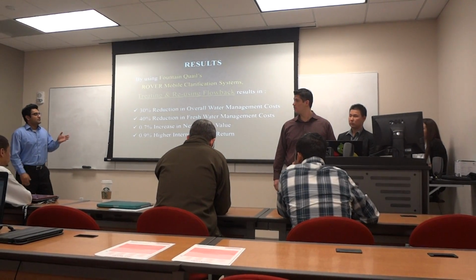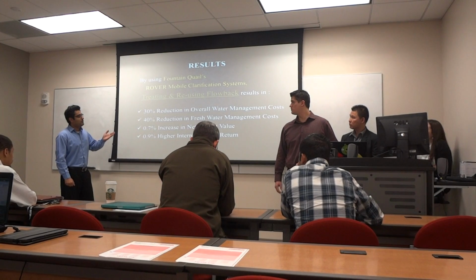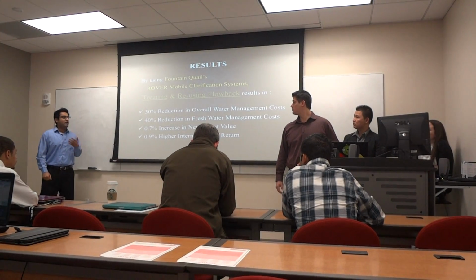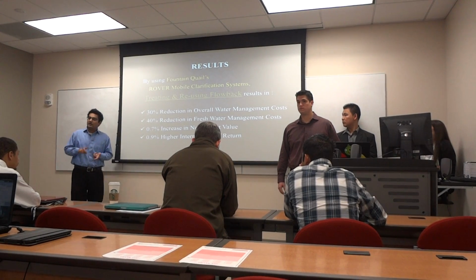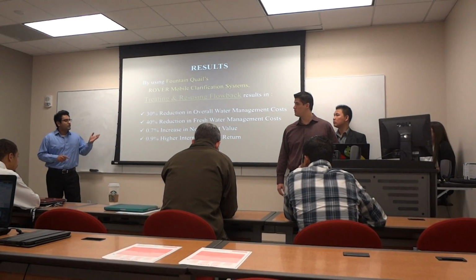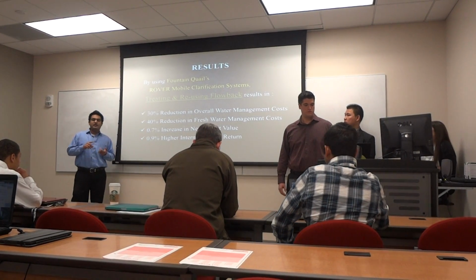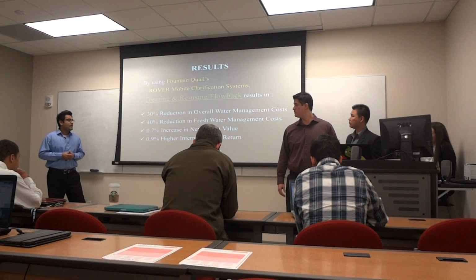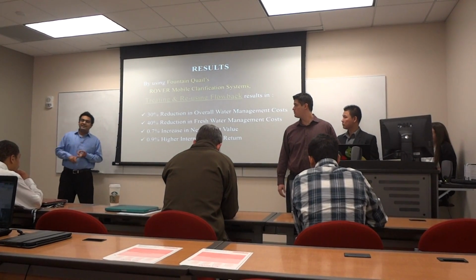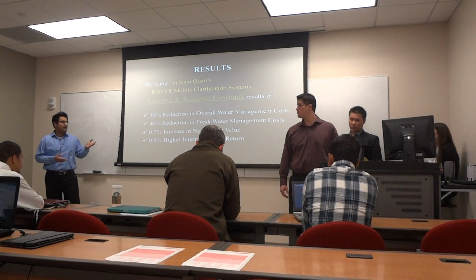Now, these are the results that we came up with for this technology. We saw a 30% reduction of overall water management costs. That means we saw a reduction in our transportation and our disposal costs. We also saw a 40% reduction in freshwater costs. That was because we had an on-site treatment facility for the flowback. We also saw a 0.7% increase in the net present value, as well as a 0.9 higher internal rate of return.